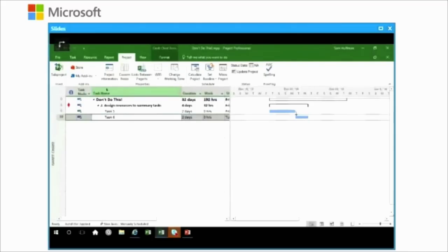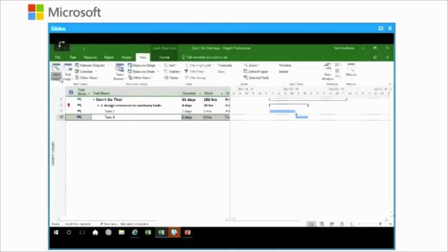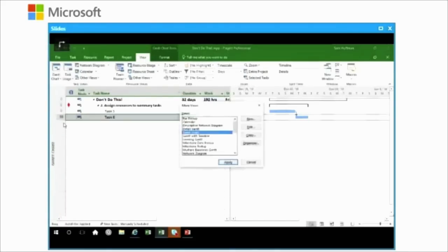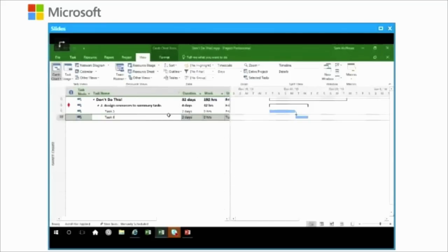So if you don't like a setting and you want to change your default, Schedule tab as an example, drop down to scheduling options for all new projects, and change it so that new tasks are auto-scheduled. Now, what that will mean is that new projects, or new tasks in all projects from that point forward, will be auto-scheduled. It will not change the projects or the tasks that you currently have open or that you currently have in your project files. So for new, that's a new point.